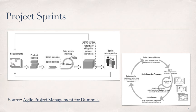Here's an alternative view of a project sprint, focusing on the iterative and adaptive nature of Agile project life cycles. The sprint, as well as the processes within it, repeats over and over for each project life cycle phase. The Scrum framework relies on the tenets of inspection and adaptation applied on a daily basis throughout the project life cycle. Specifically, during a sprint, we conduct constant inspections to assess progress toward the sprint goal and, consequentially, toward the release goal.